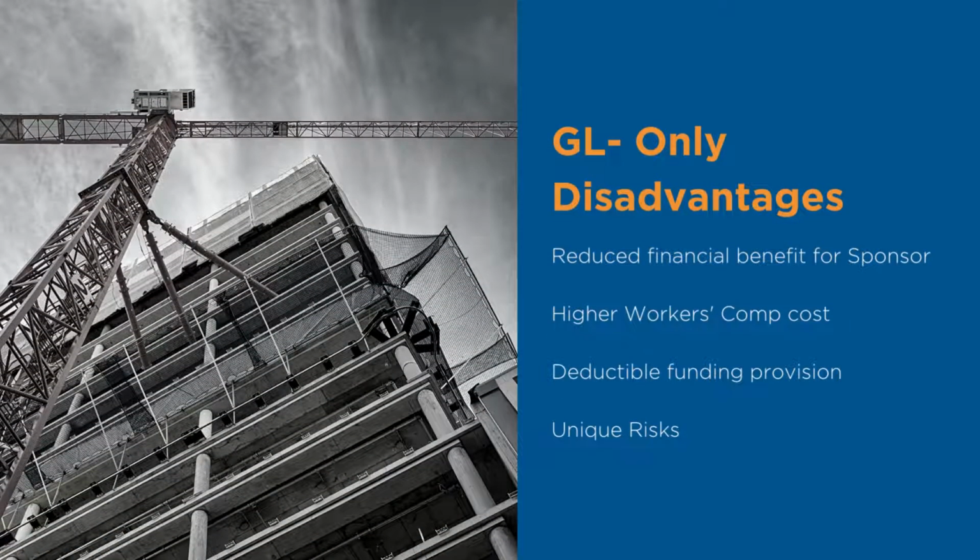A disadvantage with GL-only CIPs is the reduced ability of the sponsor to obtain a financial benefit. With the workers' compensation being provided by the individual contractors, the cost of that insurance is based on the contractor's size and may yield a higher cost than a single workers' compensation placement for the entire project. Additionally, some contractors may include a provision for deductible funding within their contract price, leaving no opportunity for savings to the sponsor as a reward for providing safety, loss mitigation, and claims management for the whole project.